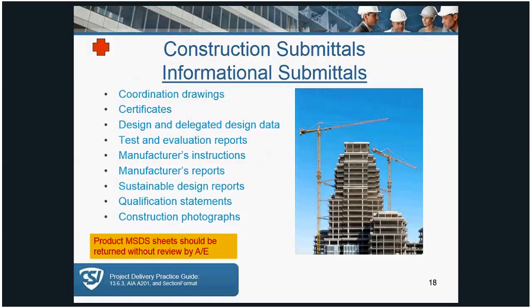One of the things that's very important is if architects receive MSDS sheets, which you commonly get, those should not be reviewed. Those should be simply returned to the contractor and not processed. And we should document that they weren't reviewed in the transmittal back to the contractor. Next slide.